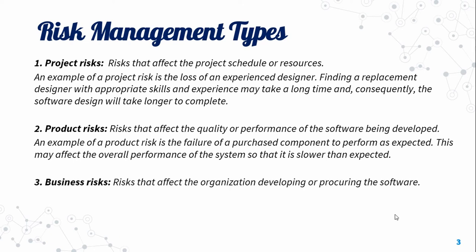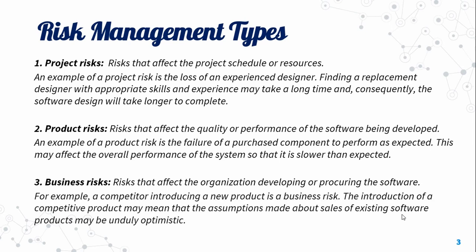Business risk refers to risks that affect the organization developing or procuring the software. This means the organization and performance are affected. For example, a competitor introducing a new product is a business risk. Our competitors may release a type of software from within the company with new features and technology, which creates a business risk for our new software.